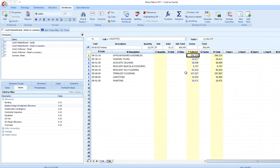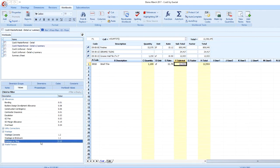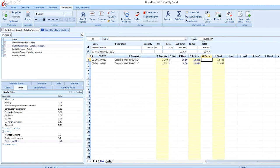Values can be dragged and dropped into the workbook to establish live links. A single value can be linked in various places throughout the estimate.